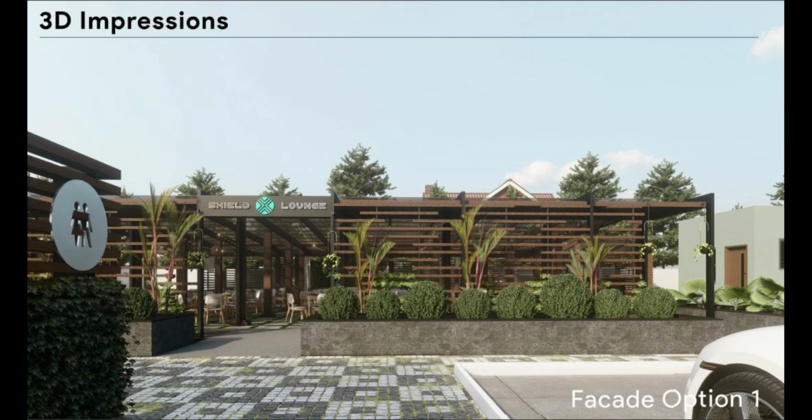Okay, so let me give you an example of a project I'm actually working on this week. It's a kitchen project, and the clients gave me a budget. Now, when the clients gave me the budget, what I did was I fished around to see what I could find that would fall within the budget. Now, we couldn't get everything within the budget. I told him, this is the amount everything is going to come to. Now, this is a percentage contingency that I'm going to add to it. Reason being, it's possible that we will have some issues somewhere, or there'll be some unforeseen costs that we need the contingency for. Now, once we started the project and the clients realized, okay, this is a nice to have, and this is a nice to have, and this is a nice to have, the contingency was available to use for all the nice to haves, right?